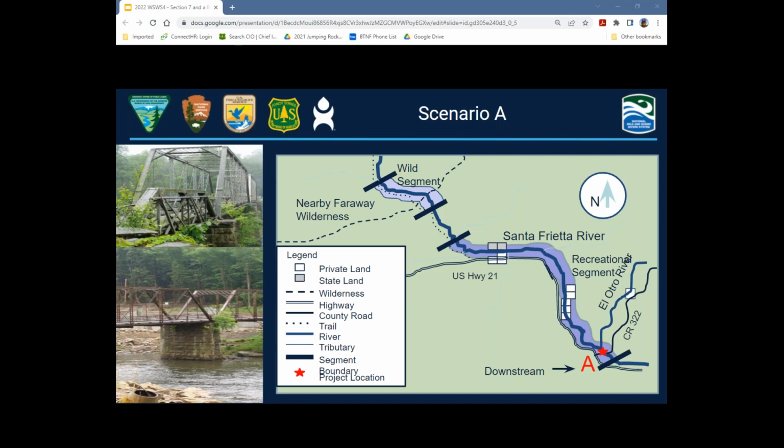Reconstruction of the bridge is needed to address the deteriorating conditions and safety concerns. The bridge is falling apart. It's built for horses, not semis. The project will include realignment of the approach roadways. The new bridge would be located immediately upstream, about 72 feet above the existing bridge. The new bridge would use 2 piers rather than the existing 3 piers that are below the ordinary high water mark currently. The old bridge will be removed at project completion.